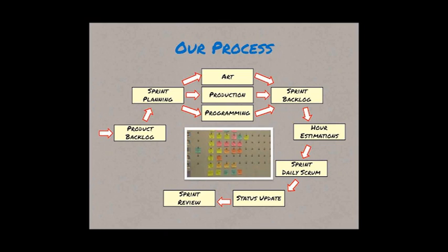We also talked about how the sprint went, what was still left on the board, if anything, and why those tasks didn't necessarily get done, or why certain tasks got done quicker than we expected, so people had extra time at the end of the sprint, which happened on occasion as well. Then we went into our sprint retrospective after that and just talked about ways we could improve our performance for the next sprint.